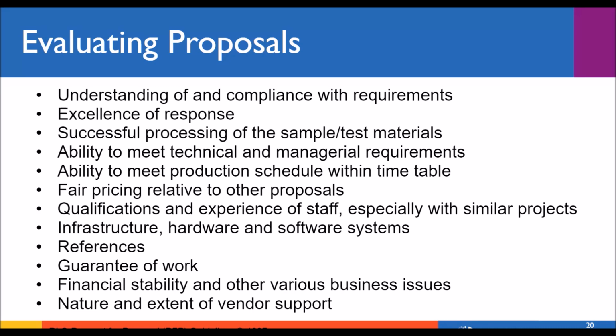Now, while it might be easier to select the cheapest option, that might not be the best fit for your project overall. If a proposal is way under or way over the amount of the other proposals you've received, it's likely that that vendor either doesn't have the ability to perform the job or they just don't understand what's being asked of them. Either way, this is not a vendor that you want to use.